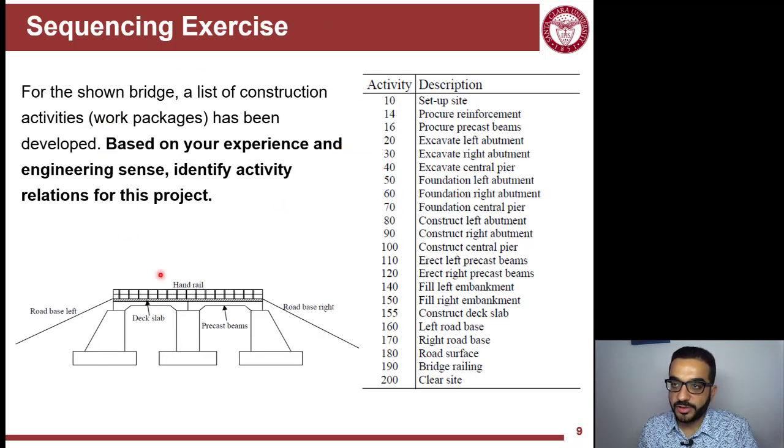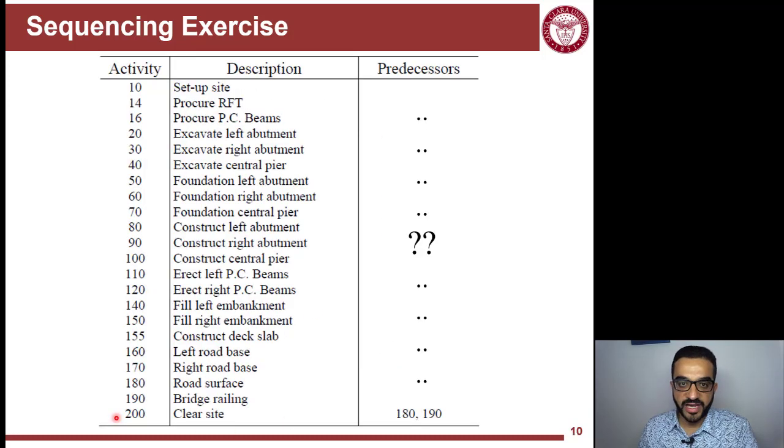So we can practice the sequencing of this simple example. This example here, we've seen it in the previous project when we practiced WBS. That's now the activities list from a possible WBS. And the exercise for you is to sequence these activities. I'm representing activities by the code here. So the idea now is you start backward. You start from the finishing activities, and then you start thinking what activities need to be done before these activities that I'm considering now.